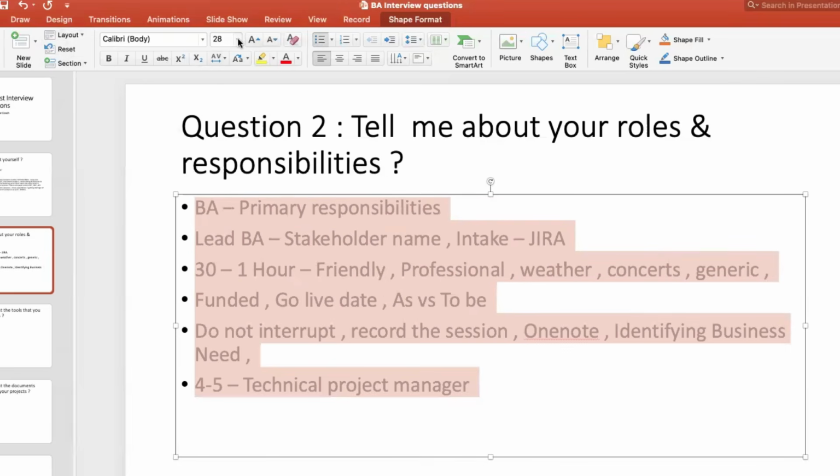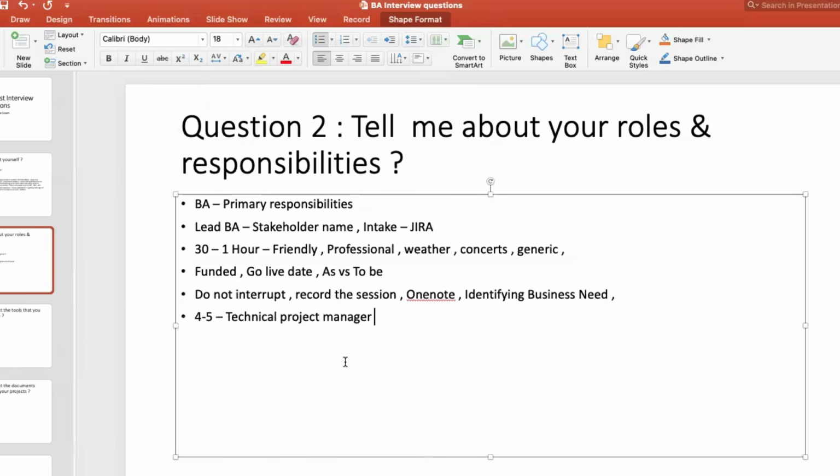I got an idea, but there is something called t-shirt size funding, which you can give. What is t-shirt size funding? It means on a very, very high level, you're going to say this is going to take 100K, 200K, 300K for your team. It's not the exact funding that you're going to tell the business owners. T-shirt size means generically you're thinking that this project for this AI chatbot is going to take at least 4 to 5 months.